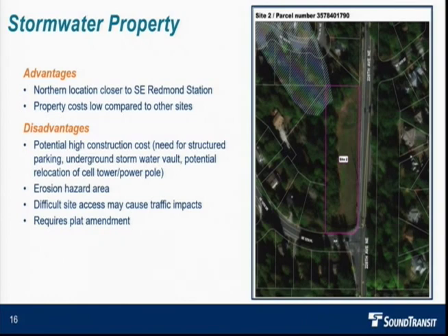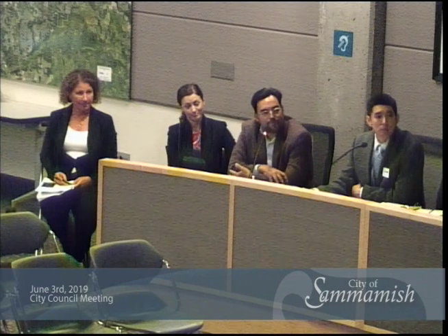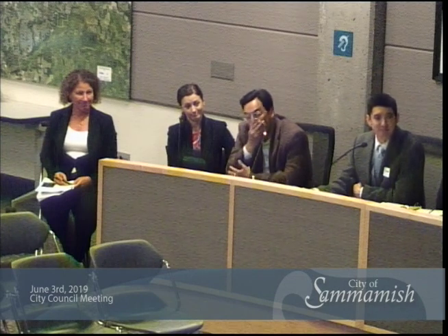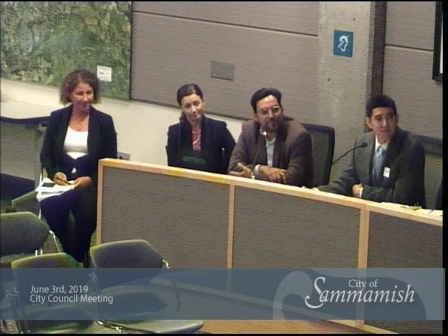And it also becomes a pretty difficult site, given that the city requires the entire plat, or at least more than 50% of the plat, to accept a change. The process is called a plat alteration, so that needs a hearing examiner process. Yeah, I think there's the high potential of LUPA going on here with a plat alteration.